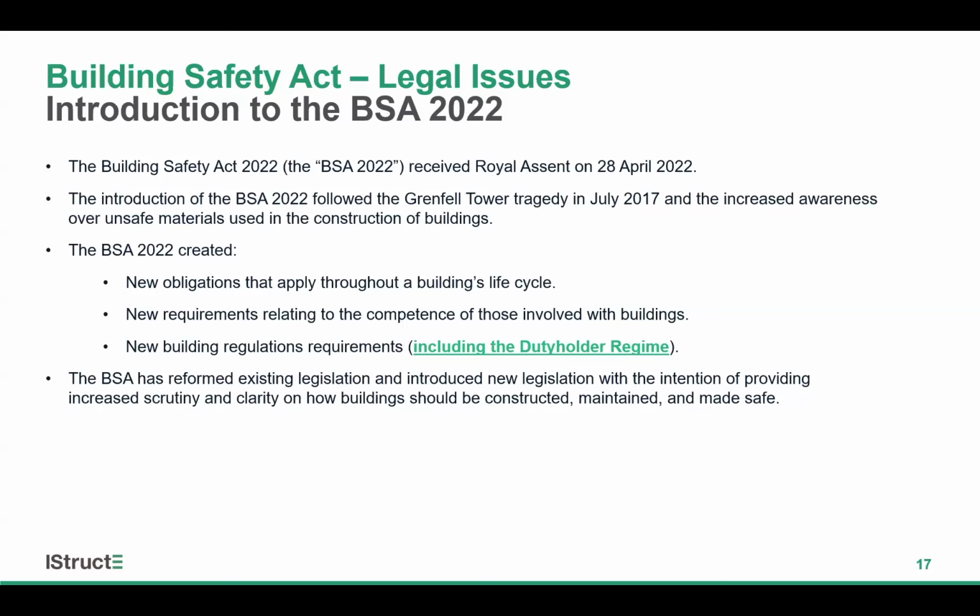So the Building Safety Act introduced an extension to the scope of the Defective Premises Act, which applies to all dwellings in England and Wales and enables the owners or anyone with a legal or equitable interest in the property to pursue a claim for defective works where the work renders the dwelling unfit for habitation. The Act expands that scope so that it now also includes refurbishment works.